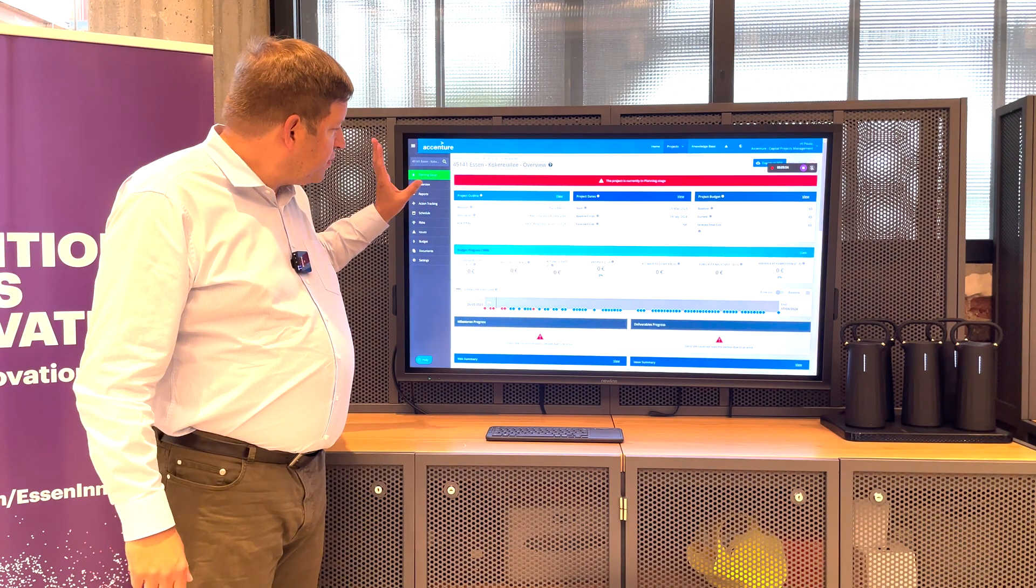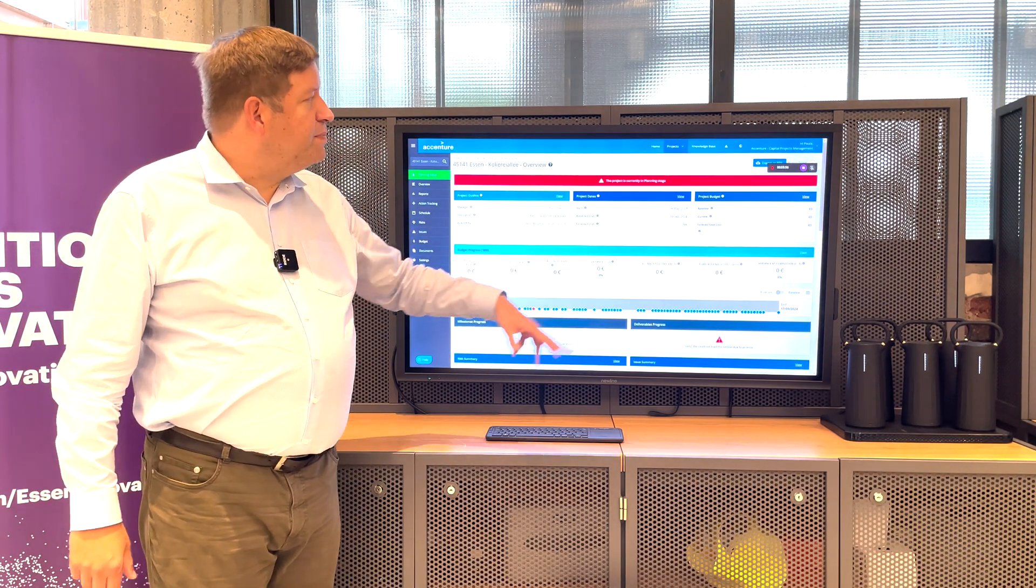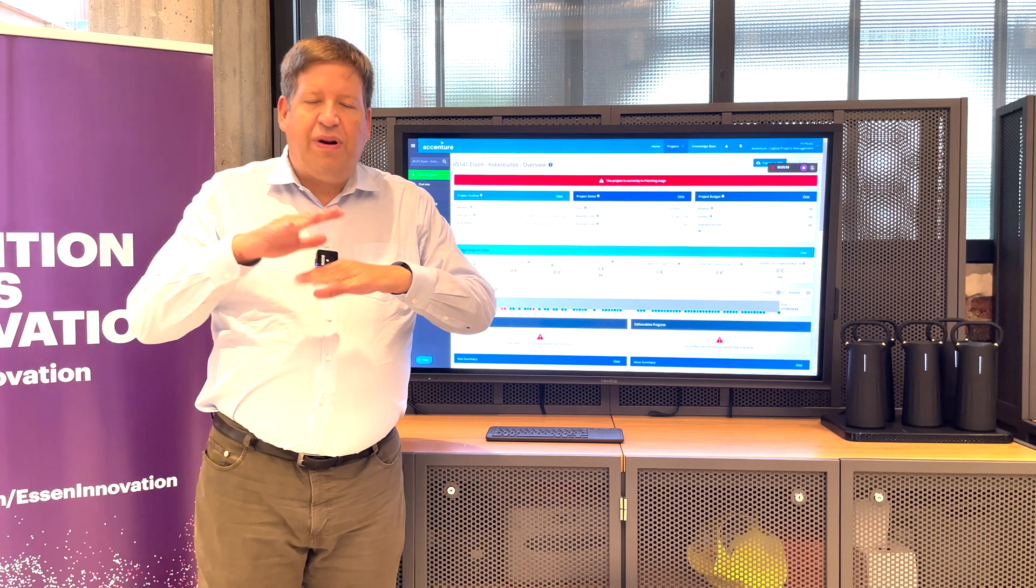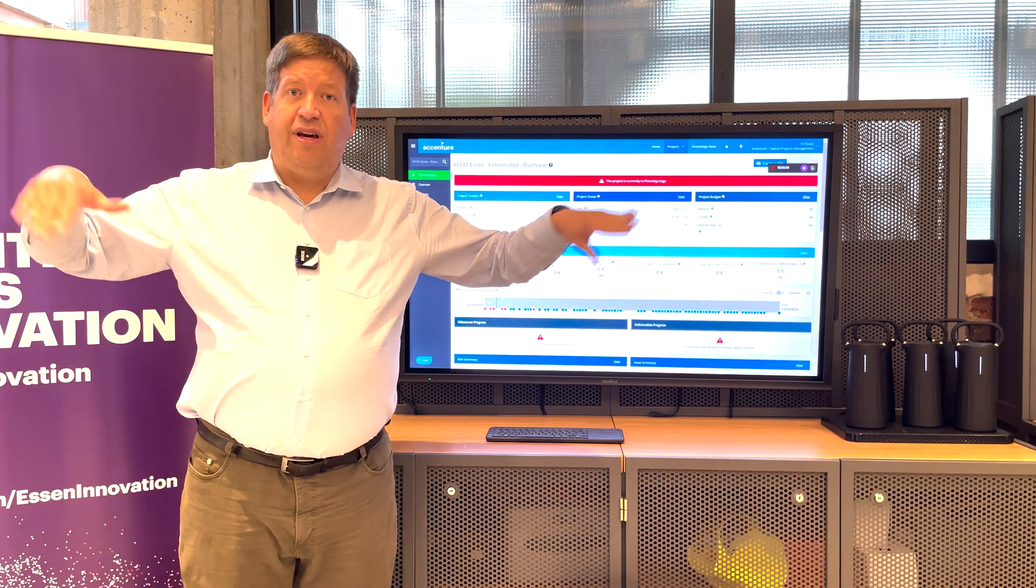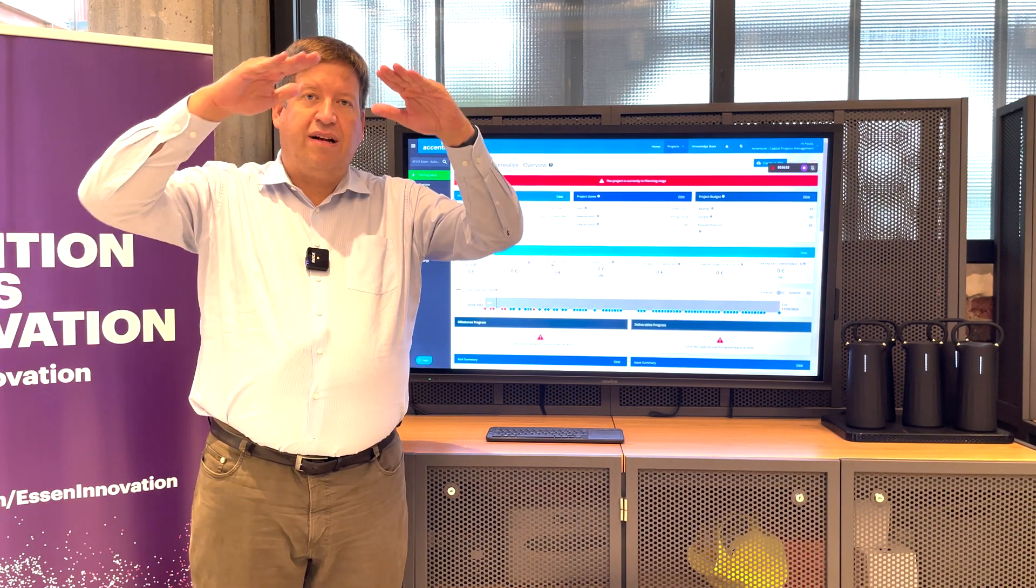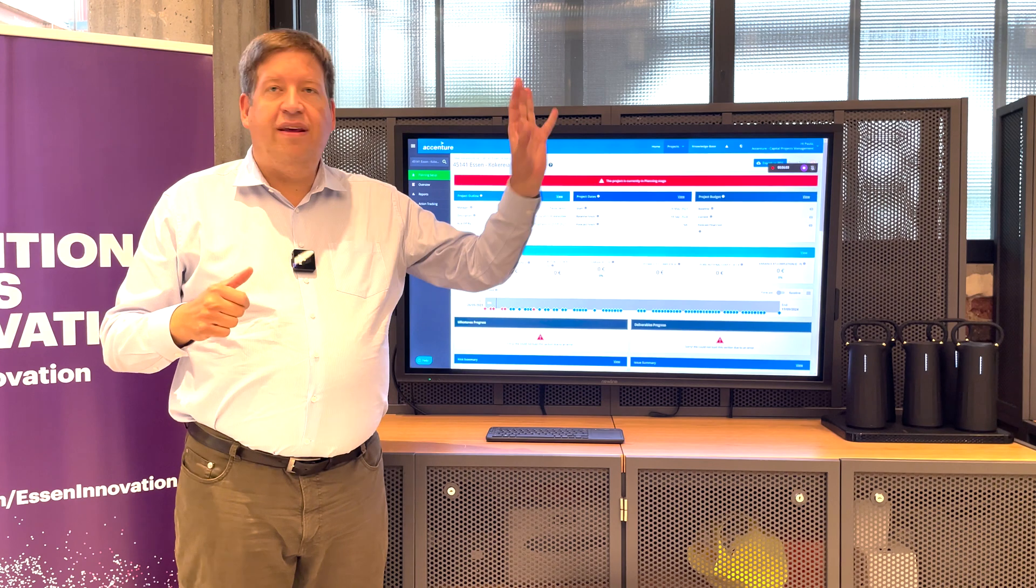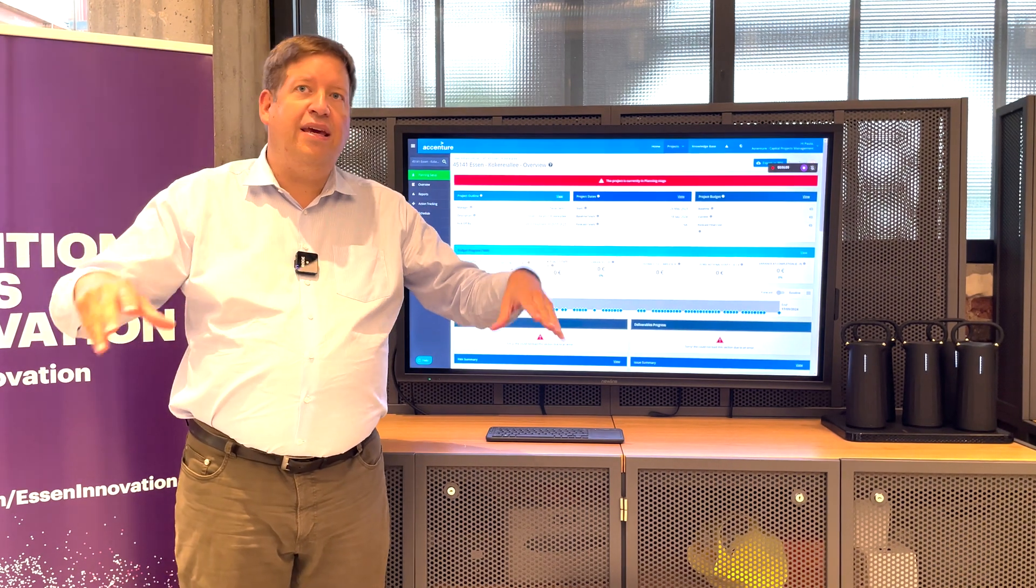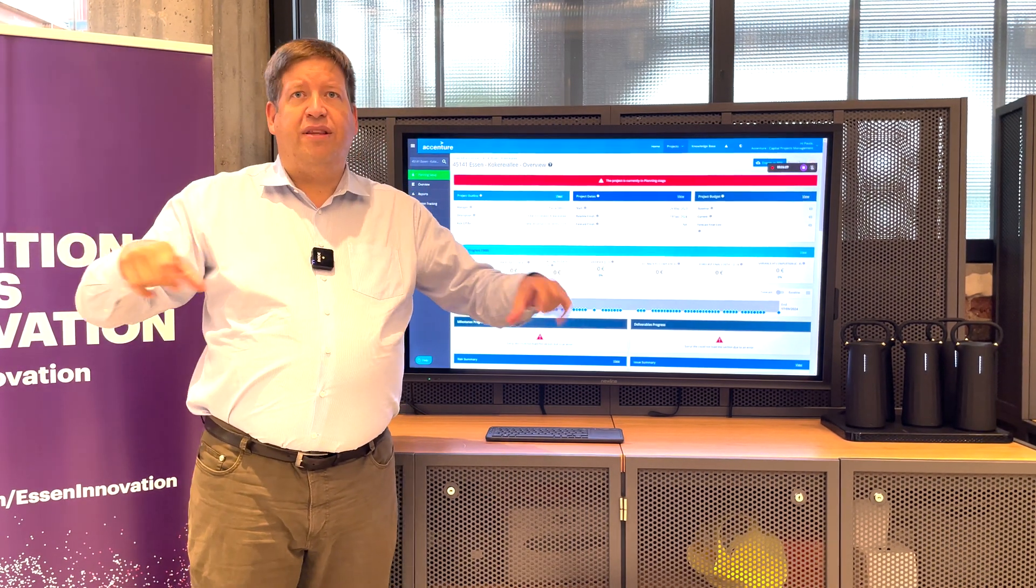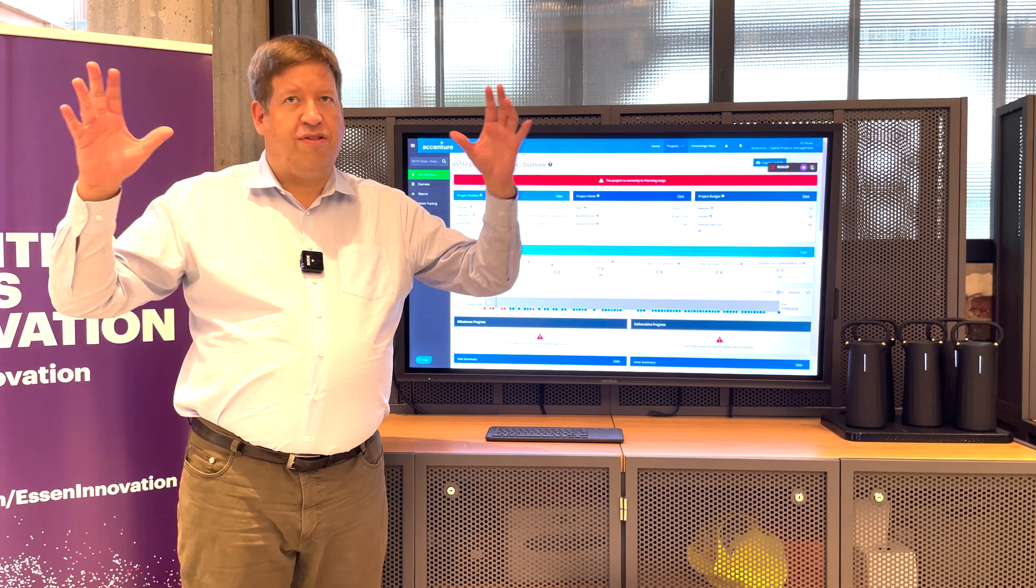You see the main milestones, and you can split that into multiple layers. So, you can have probably multiple sub-projects, for example, building A, building B, building C, then another project managing the utilities between the different buildings and so on.